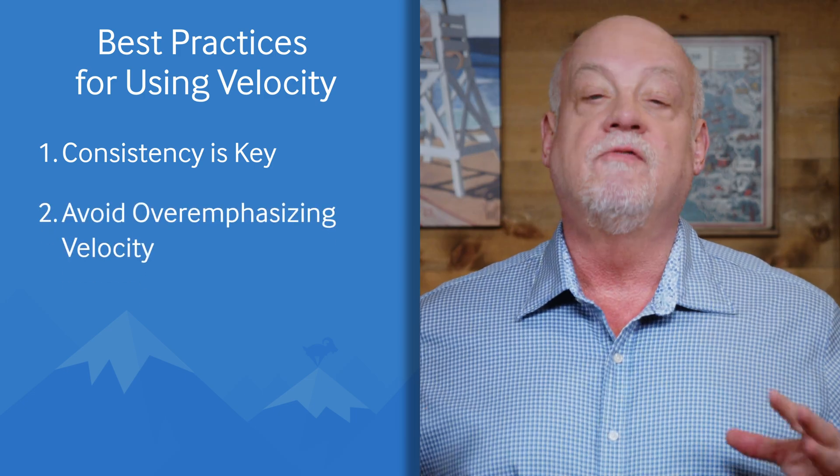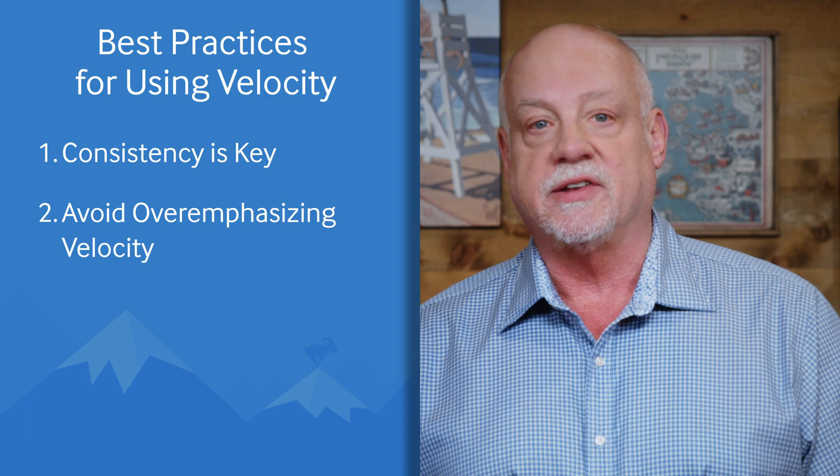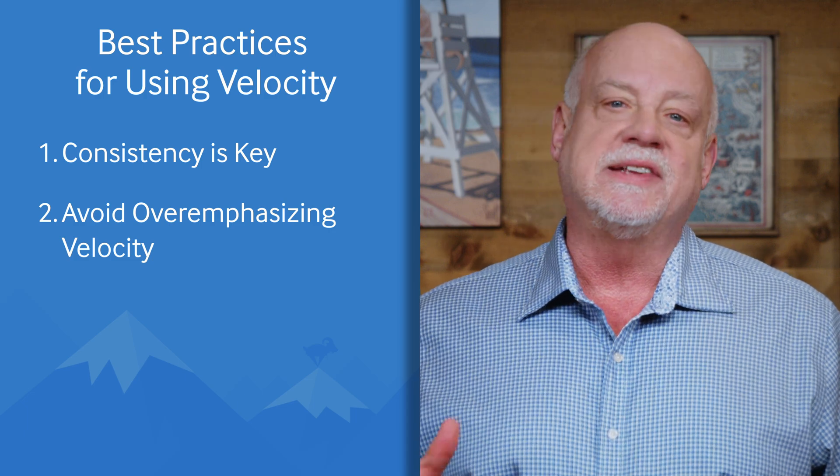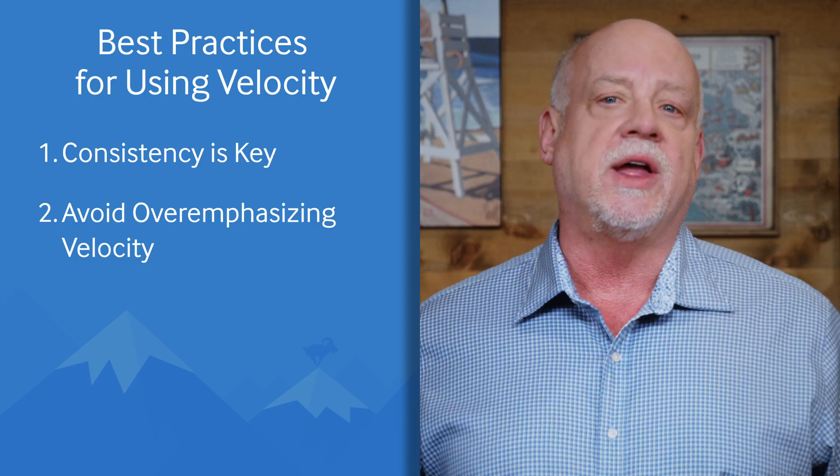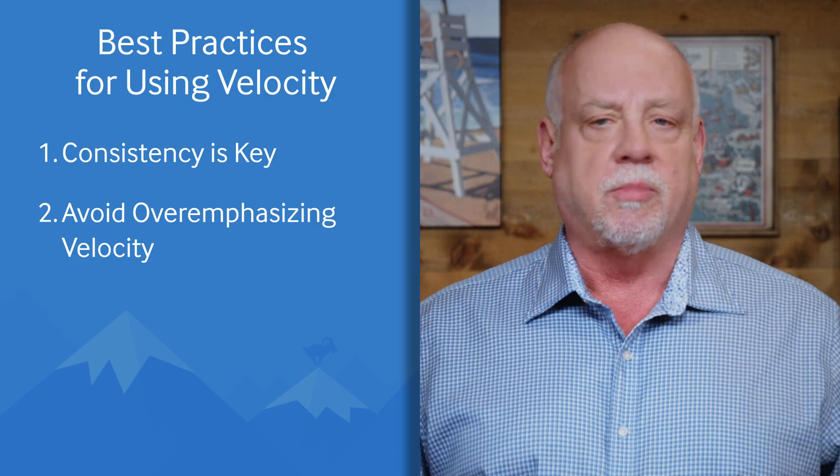Number two: avoid overemphasizing velocity. Although velocity is an important metric, a team's primary aim is to deliver meaningful products or features. Overemphasizing velocity can result in teams compromising on quality or resorting to excess overtime. While overtime can provide a temporary boost in velocity, relying on it continuously leads to product defects and employee burnout.